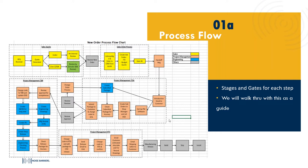We then move into the drafting department, which we'll cover in more detail further along. They go through the process of preparing general submittal drawings, which are sent out to confirm we understand the scope and concept of work and the size of the windows or product purchased.